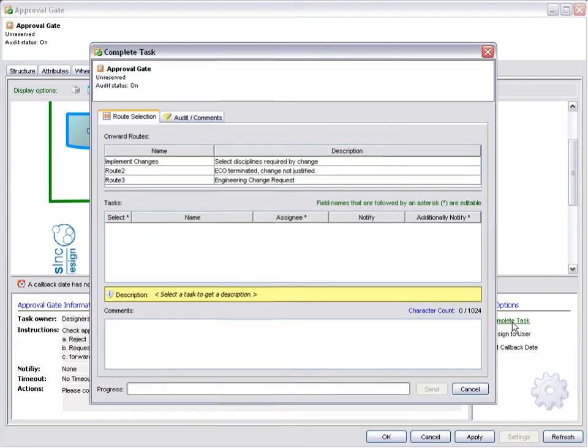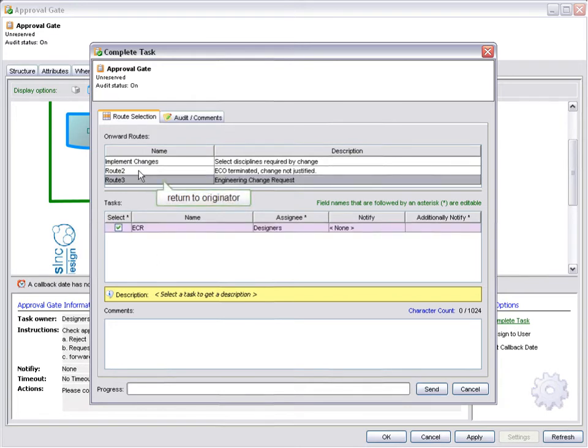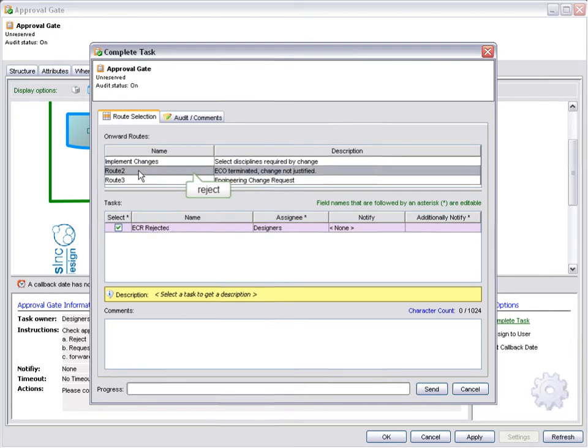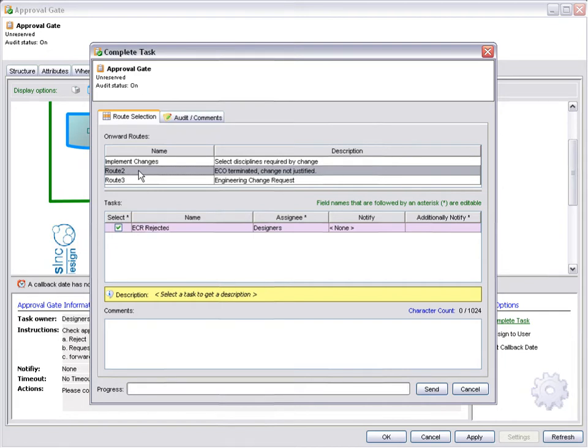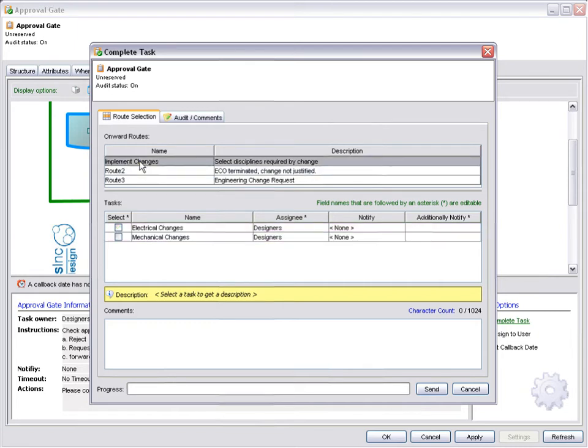Notice here the routing options. We can return to the originator. Or we could reject. Sending to a rejection node will terminate all open steps on a workflow. On a more complex workflow, there could be tasks waiting in parallel steps. These will all be terminated and removed from the user's task list as soon as the workflow is sent to the terminating step. The change order is approved and is ready to be sent forward for work.